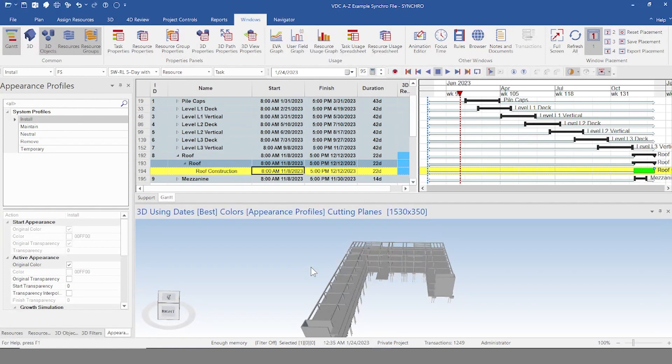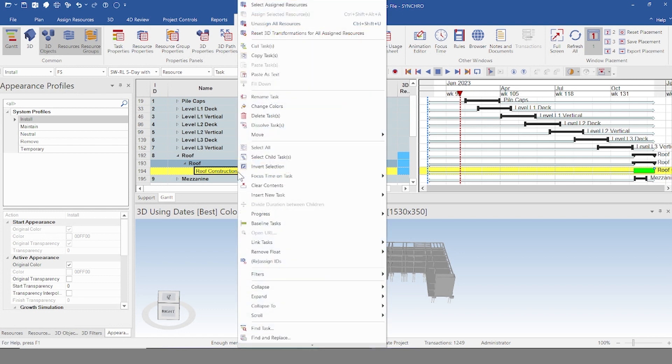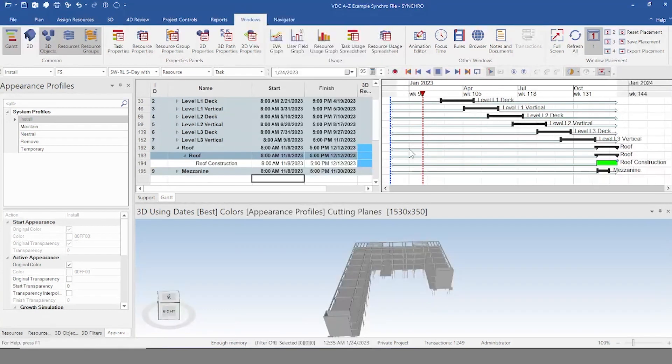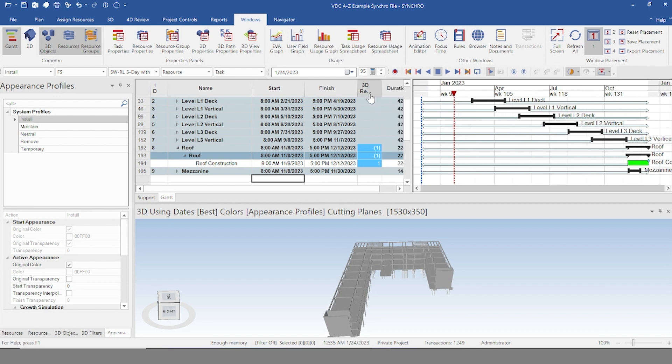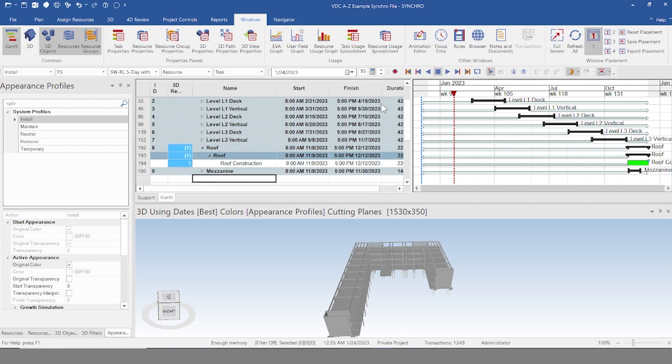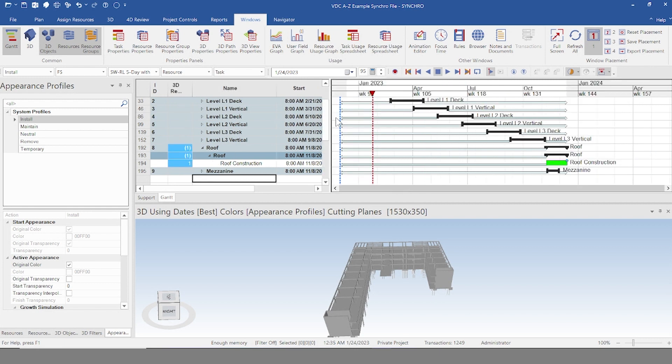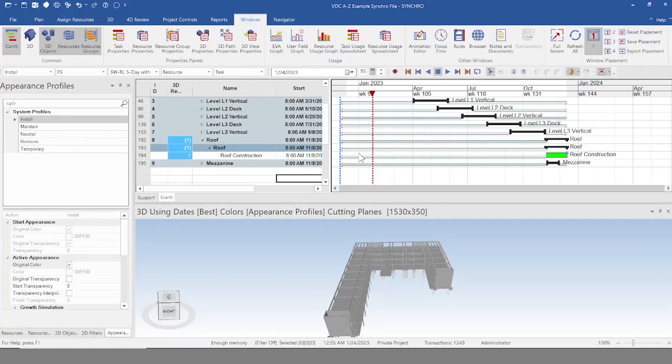If you make a mistake and you want to unassign your resources, you just right click and do unassign all resources. Something else that's helpful is that there's this column here that tells you how many items are assigned to any particular task. It's actually good to kind of move this next to here. So it makes it a little bit easier to see.